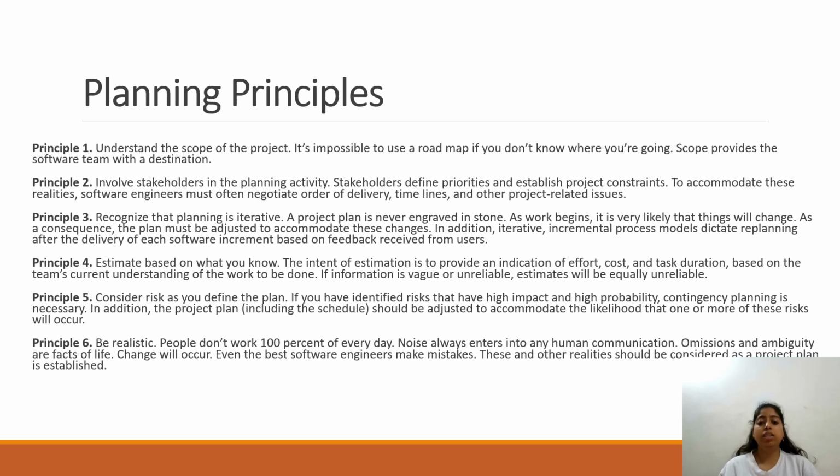Principle number 4, estimate based on what you know. The intent of estimation is to provide an indication of effort, cost, and task duration based on the team's current understanding of the work to be done. If information is vague or unreliable, estimates can be equally unreliable.